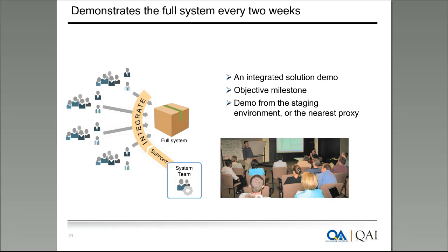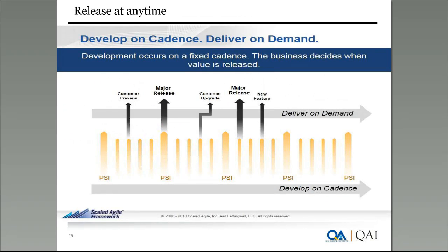For example, if individual agile teams are delivering in alternate weeks, like the 2nd week, 4th week, 6th week, some outputs of the user stories they have committed, then the system team takes the outcomes of each of these teams, integrates them and gives a system demo to the program stakeholders on the 3rd Friday, 5th Friday, and 7th Friday, perhaps with a 1-week delay. This is how the demo happens. This is how the agile teams start delivering with the incremental and iterative approach, and they develop on cadence.